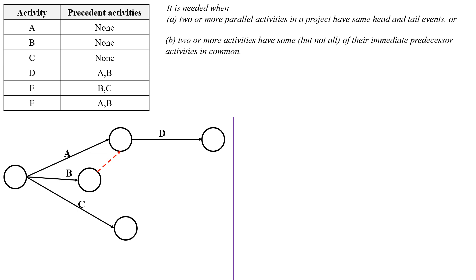Next activity E. Activity E will start immediately after completion of activities B and C. So draw the activity E like this. But this represents the activity E will start after completion of activity C only.